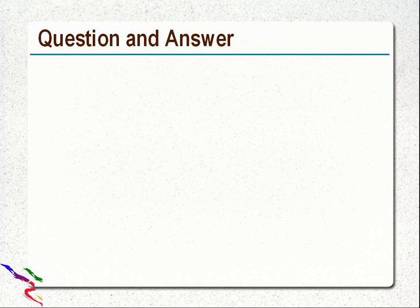Viral has asked a question: if we have a big project that needs 15 developers, then how do we define the sprint? So I think up to 10, 15 or 20 resources, there is no problem. With more resources, we might need to break up the Scrum based on the different functionalities or different initiatives in each of the product. That is Scrum of Scrums, managing multiple Scrums for a product.